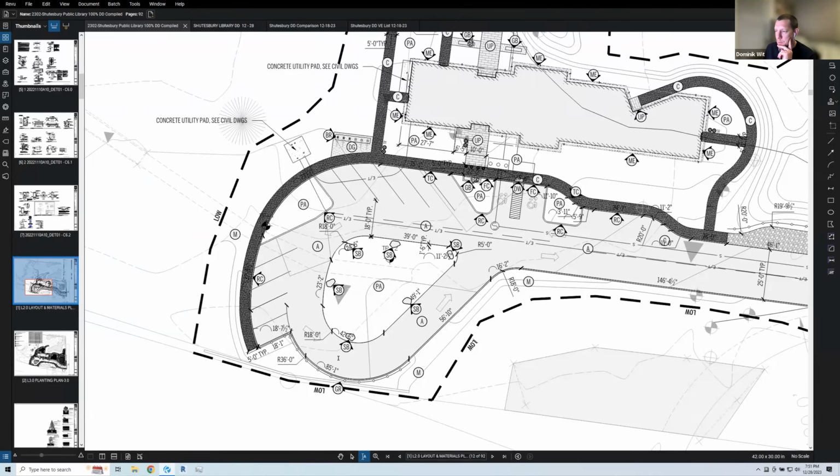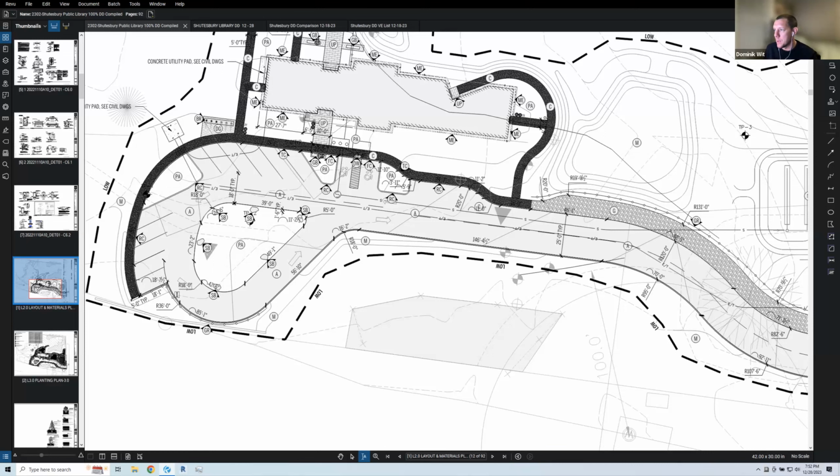Then we also wanted to replace the granite curbing with bit berm or Cape Cod edging, which we would see $30,000 savings. Is that everywhere? No, the reason initially we did not have any curbing along this edge here, but the stormwater is actually relying on that edge to help sheet water back to the drainage elements that are picking that up. So we currently own scope for granite all the way along here, and we could easily do that with the Cape Cod berm.